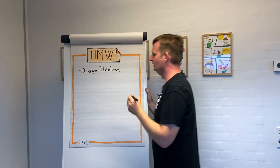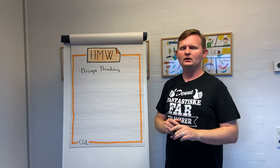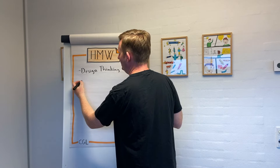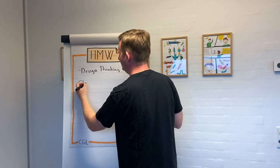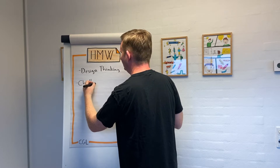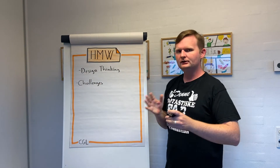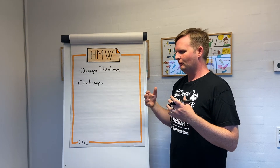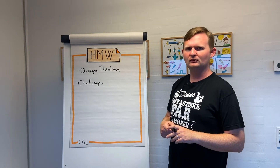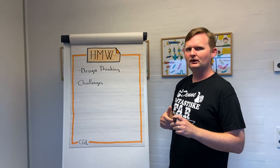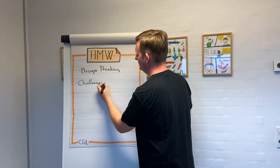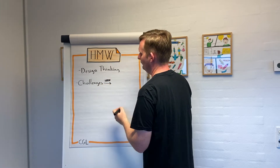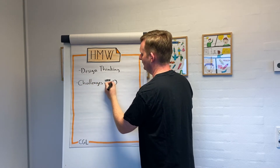Let's imagine we've had a retrospective and people have come up with a lot of impediments — things that are not working, some challenges. The real question is: how can we take these challenges into something we can work with, without being focused on a specific solution? How can we keep curiosity about what the actual problem is? This is where we can use 'How Might We' as a tool to rephrase these challenges into questions instead.